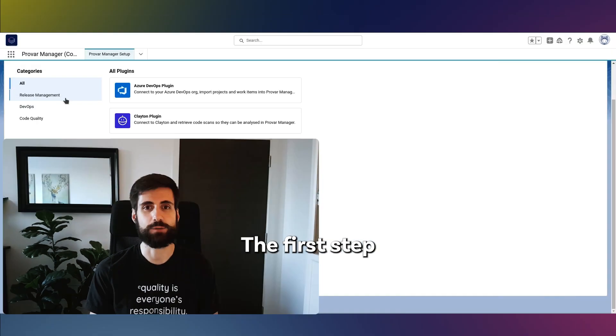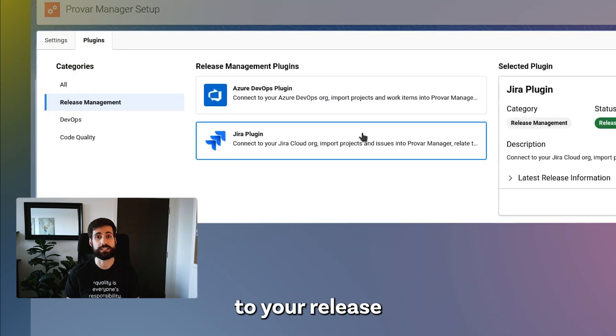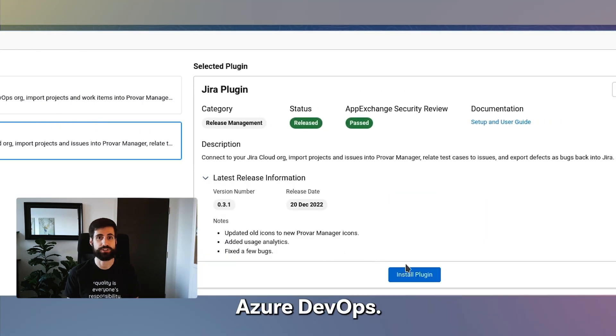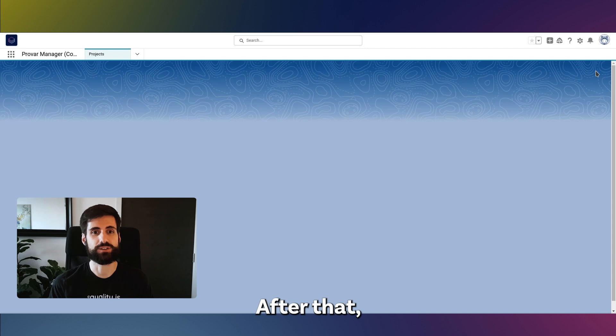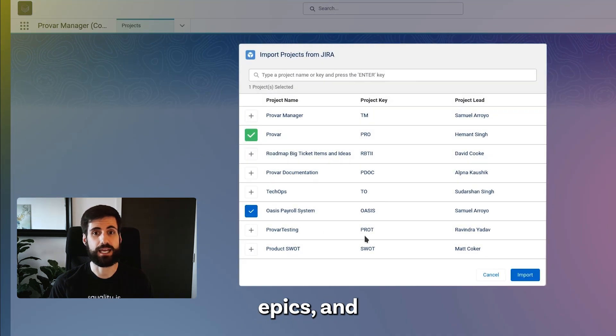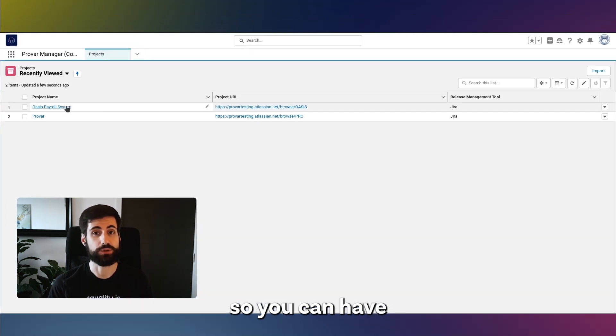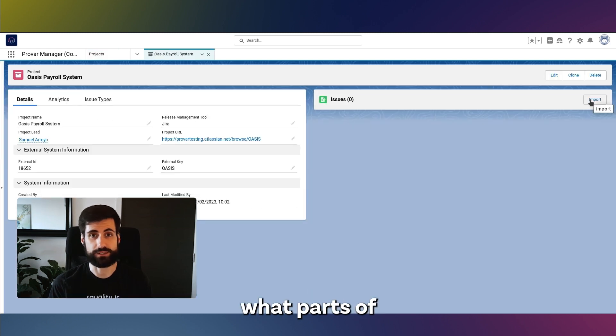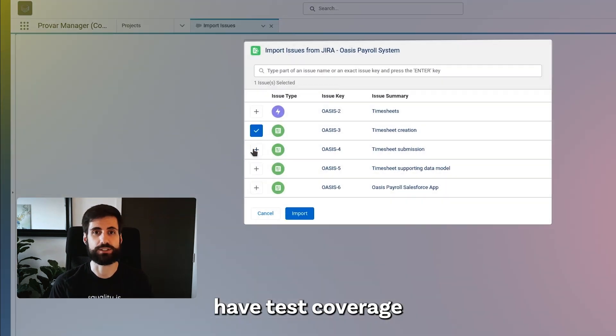The first step is to connect Program Manager to your release management software like Jira or Azure DevOps. After that, you can import your projects, epics and user stories into Program Manager so that you can have an idea of what parts of your project have test coverage and which don't.